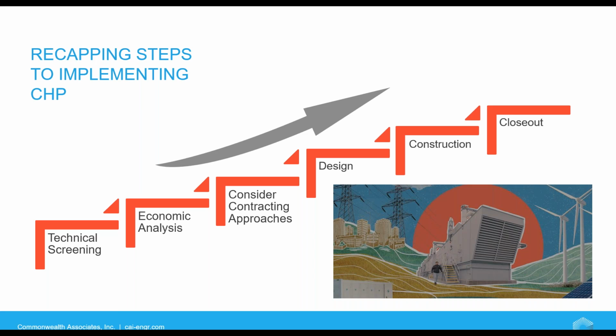From all that, an RFP was then developed, issued, and bids were evaluated with the selected contractor being negotiated with, leading to an award with ENGIE. ENGIE then took over on the design and construction side, so those two little plateaus, but they had oversight from Eastern Michigan staff and Commonwealth staff throughout the process.